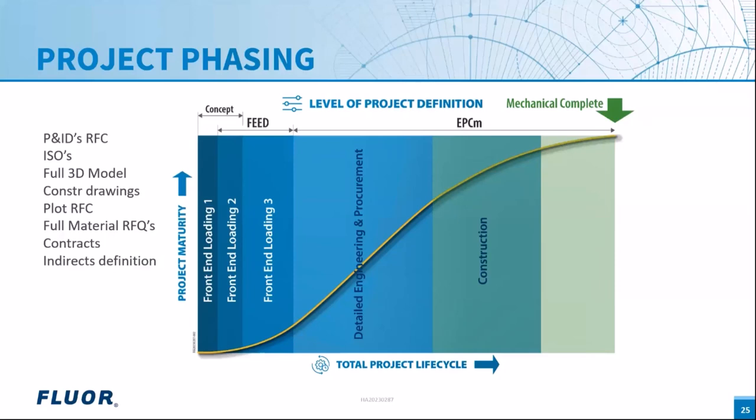In the EPC phase, the release-for-construction P&IDs are translated into actual construction activities, overlapping with detailed design, and finally mechanical completion is reached. We want to focus on the front-end conceptual phase to understand how estimates are used there.